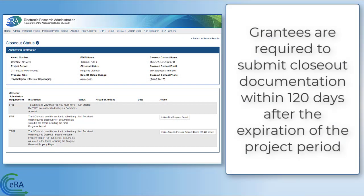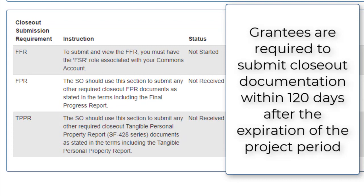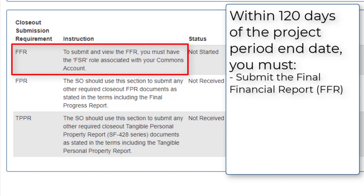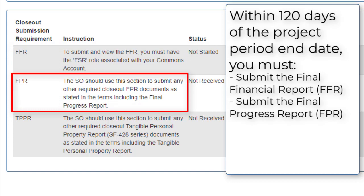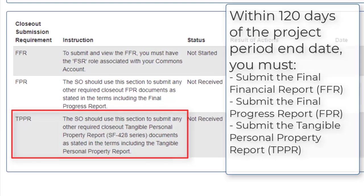Grantees are required to submit closeout documentation within 120 days after the expiration of the project period. Within those 120 days, you must submit the Final Financial Report, submit the Final Progress Report or other reports required by the terms and conditions of the award, and submit the Tangible Personal Property Report to account for any property acquired with federal funds.